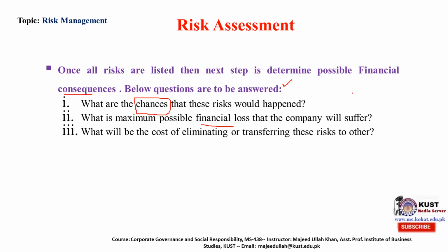If the financial loss is not too high, then there is no need to worry about that type of risk. What will be the cost of eliminating or transferring these risks to others? If the cost is too high and the company feels it is not possible to bear that much cost to eliminate or transfer the risk, then the company should not take that type of action.